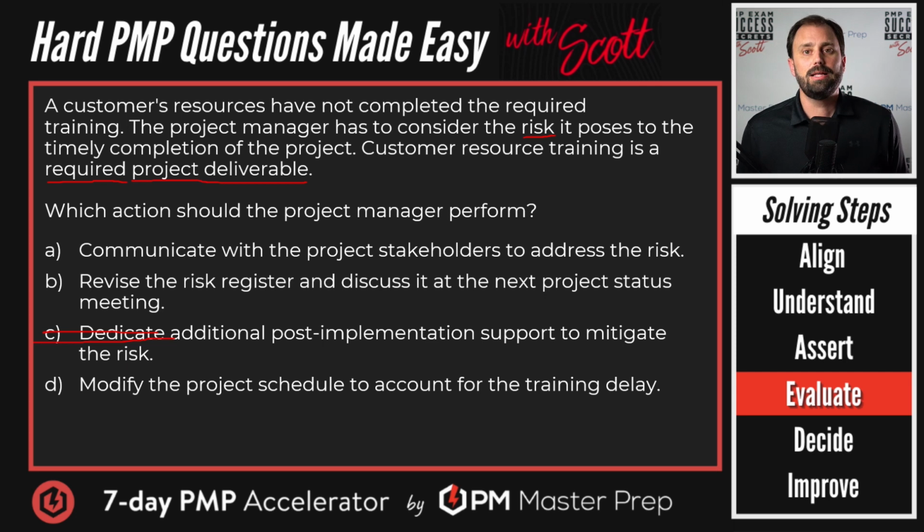Come on, guys. Do we like this or not? Hit the button, say you like it or not, and tell me why. Now, I don't like this at all. Just because we're late with somebody, every time we're late, we're going to push the schedule out? No, we never finish anything, right? What we've got to do, first of all, is we can't modify the schedule, because we have to go through the change control board, which it doesn't say to do in there. It just says, go ahead, willy-nilly change it.